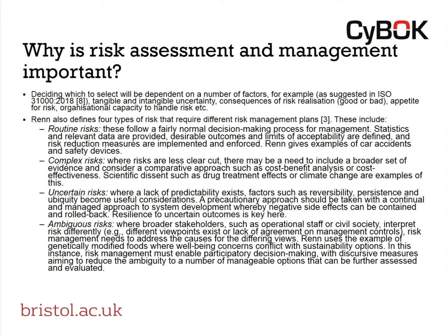So deciding which to select is going to vary between different individuals, different organizations, and will depend on a number of factors. There's some advice on this in the various standards, ISO 31000 being a good one. It's really based around the consequences of the risk realization, the appetite for risk, the organizational capacity to handle risk. Small companies, for example, perhaps don't have the same amount of resource to be able to manage risks, so they have to take slightly more risks. But again, that comes down to the appetite of the people in charge of the organization and the people operating the organization.